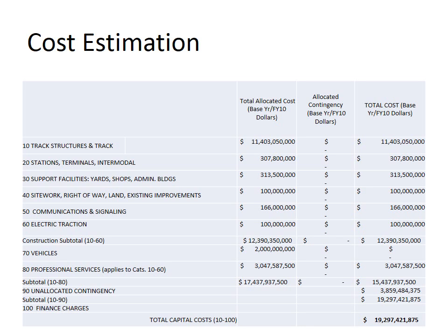Also, the train will cost quite a lot, and upon the direct cost, we estimated that there will be fees for the design and the construction management, and we have allowed a 35% for contingency to cover any problems that are not foreseen at the moment.